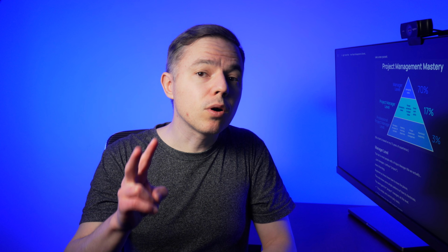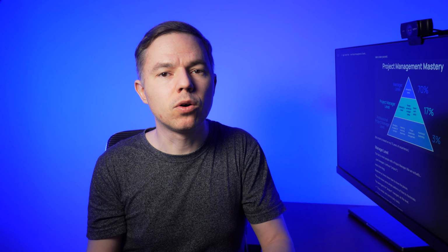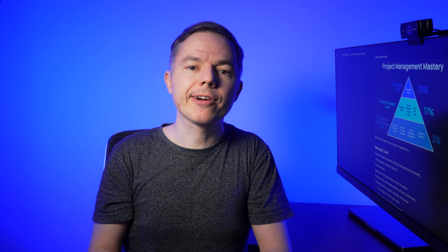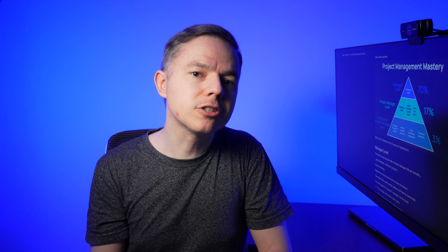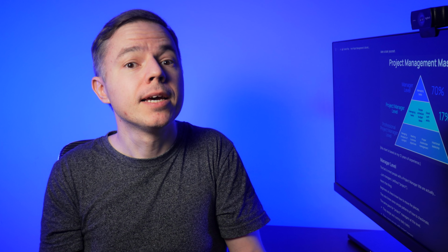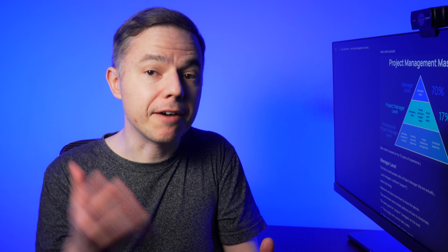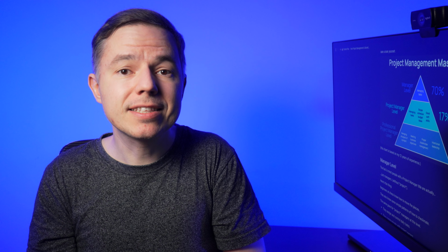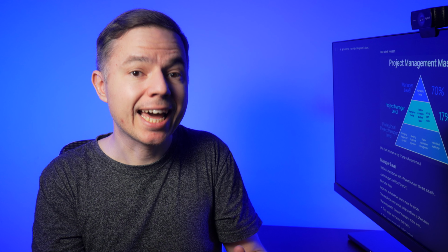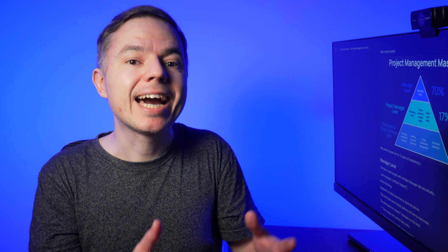The same two columns help you avoid gold plating. Imagine that a stakeholder also wants to upgrade the underlying technology stack within the same project. Is the upgrade a good idea? Well, maybe, but project owners allocated $500,000 to improve user experience. Does the upgrade of the technology stack help us reach the business goals?